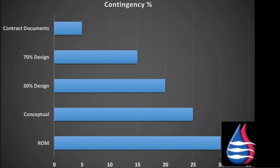There are different names and categories of contingency such as design contingency, construction contingency, and owner's contingency. No matter what you call it, it will cover some anticipated or unanticipated costs. The design contingency can include coverage for errors and omissions in the design documents, as well as changes and upgrades in the design.